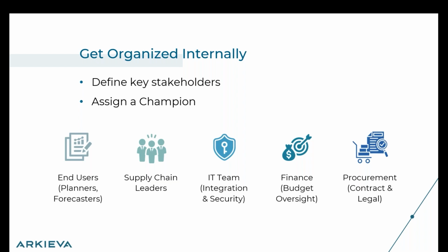You have IT team. They may not have a full say in what they like or they want to use, but they certainly can have a say in what they will not allow given the IT landscape of the company. So you want to make sure to get that input. I've seen many selection processes where IT team was only brought in the end and they raised a flag and said, we cannot work with this particular software because it does not meet this XYZ criteria, the IT criteria. So while they cannot say yes, they can easily say no. So you've got to make sure you involve them early on.